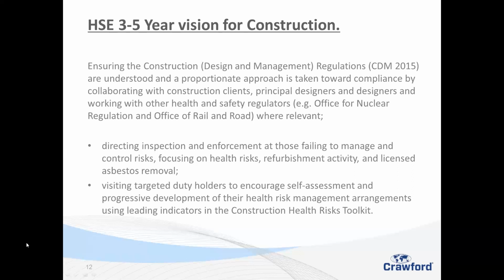I'm a great believer that we should look after all, especially on CDM, anything to do with construction and building sites. If asbestos is thought to be in there, right, let's find out where it is. Has it been breached? Has it been checked? There's something called a refurbishment and demolition survey. Have one of those then. It's an R&D. Again, I'm a bit belt and braces, but I like them to be done when there's any thought there might be asbestos on site.